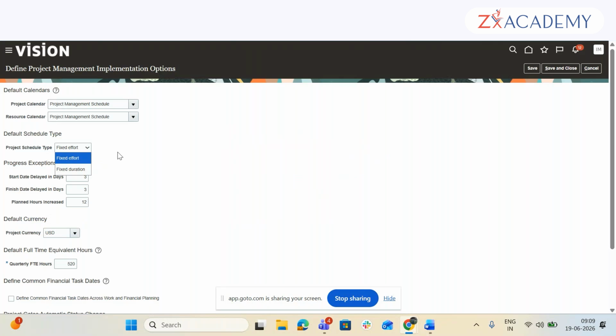But in the agreement, it is clearly stated that whatever the actual number of hours required to develop this software, the client will pay for that. So in the front end, whenever you create a project, there will be fixed effort based. So duration is not fixed. Those 300 hours you can span up to 6 months, 8 months, 10 months, any time.